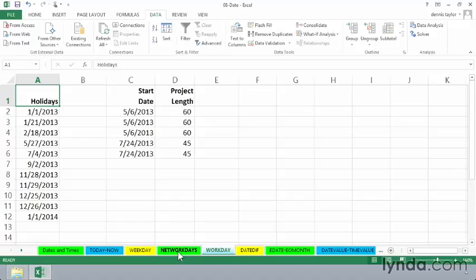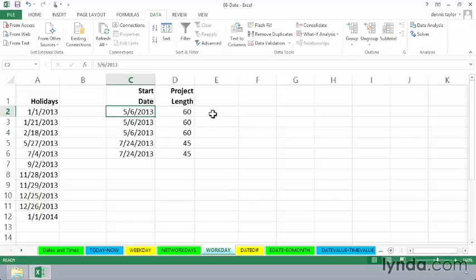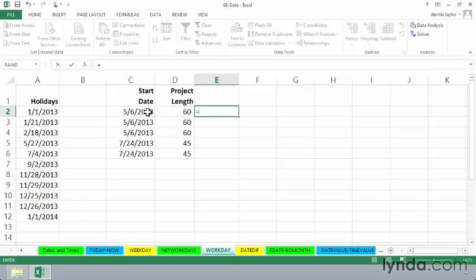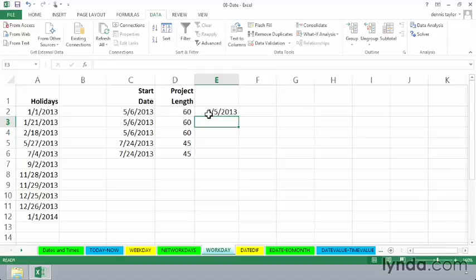It could be Fridays and Saturdays and some other combinations as well. So a simple example here of a project that begins on May 6, 2013 at 60 days, if we just do simple math here, a starting date plus a 60-day length will give us a completion date of July 5th.